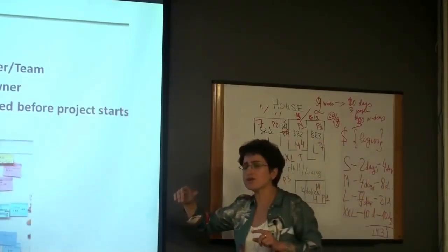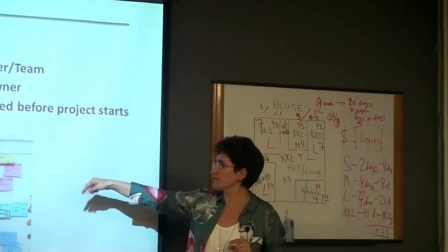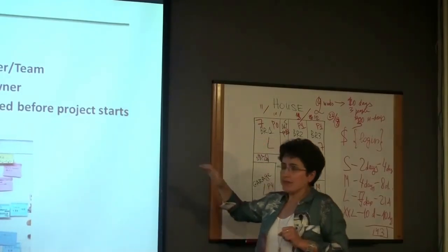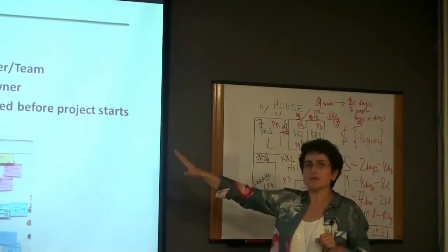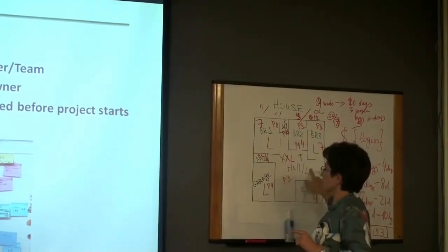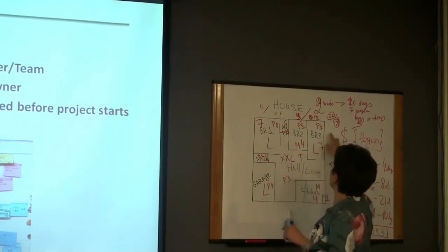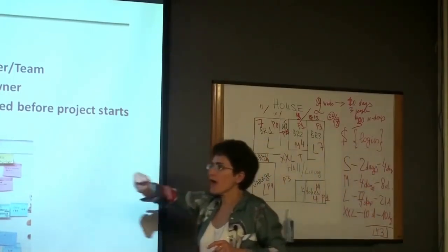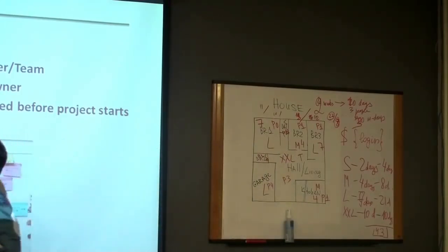you just do the retrospective meeting. I have the slides down the line. But anyway, when you plan your sprint, you try to pick from the product backlog, let's say for this house painting project, what makes sense, what you can do within 1 sprint. If you have some experience in Agile, you are likely to have more precise estimates for your development. You do not need to bucketize into small, medium, and large. Instead, you can just have the effort that it takes to develop and test. And this may come from experience.